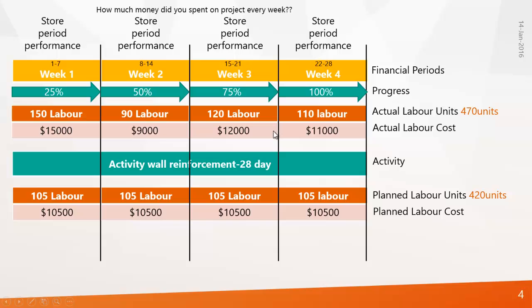Now here comes the scenario: what if your client or project manager wants to know how much money was spent on this project every week — how much labor and cost was engaged every week? To deliver this requirement, we need to create financial periods. You can create a financial period like week 1 (day 1–7), week 2 (day 8–14), week 3 (day 15–21), and week 4 (day 22–28). This is how we create financial periods.